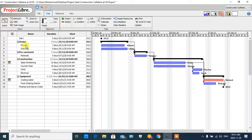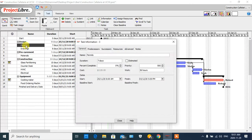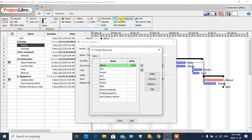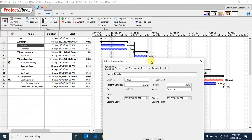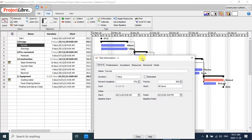If we come back to the Gantt chart, we can assign our resources here. We have two options for assignment: first, we can double-click on each task, or we can click on 'Assign Resources' in the toolbar.